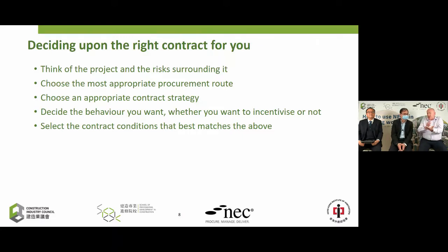So you have to decide the balance of how much do I believe in the incentivisation? Do I genuinely believe in it, or do I think, now which ones will make the contractor work best? Which one would likely produce the best outcomes? My experience is that incentives work better than disincentives. If you threaten somebody with damages, if you don't finish on time, I will hit you for damages, you will create the wrong behaviour. You will create a defensive behaviour. In fact, they'll turn that defence into aggression and actually come back after you for reasons to change the completion